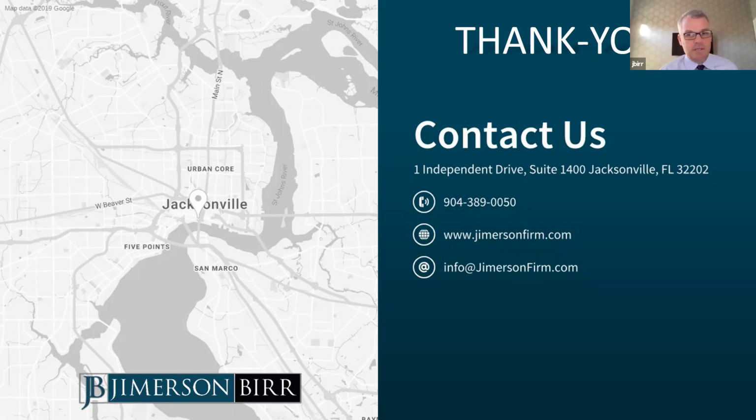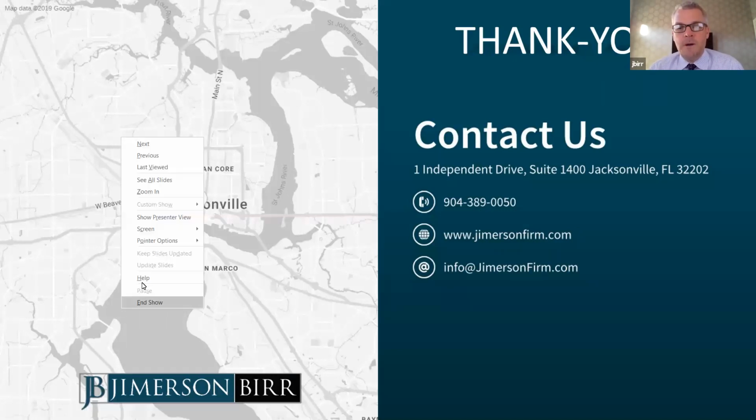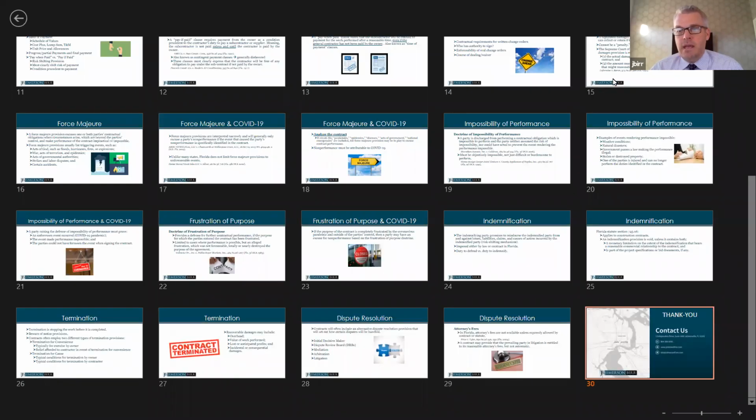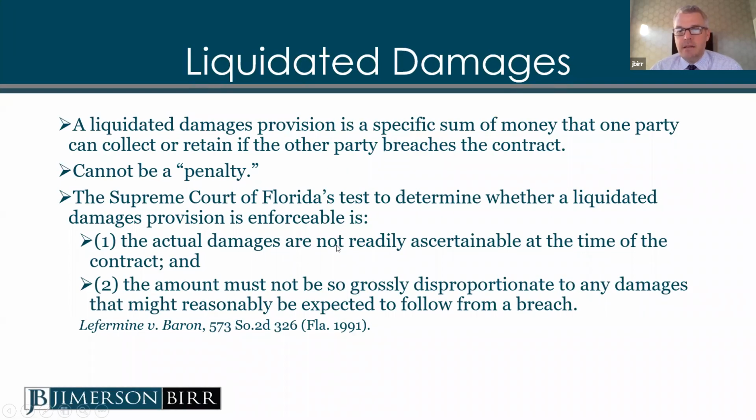Yeah, so the liquidated damages provision section that we were talking about. I think what we're talking about here is, in the context of delays on a project, and an owner, let's just use the owner and general contractor example. The owner needs to get, I'll just use a school as an example. I have clients that build schools, and they need to have a school opened by a certain date. If they don't open the school by a certain date, what is that going to cost them in rental space? They've got to find a new venue to house the school while the work is still going on.